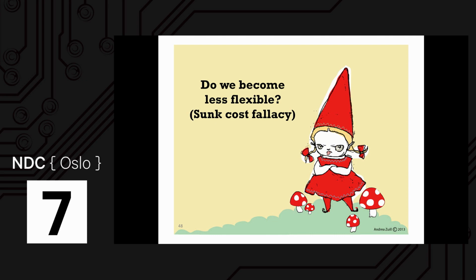And this is sort of the idea of the sunk cost fallacy. We've already spent 100,000 money units on this thing. We don't want to throw that away. We should get it done. And then we spend another 100,000 and another 100,000. Of course, here 100,000 is like a week's pay, right? I don't know. But you know what I'm saying, right? So whatever you're using to judge, we've already spent a bunch of money. That can force us into thinking we need to keep down this path that really isn't going to end well for us. But we don't yet know if it's going to end well. We need a better way to think about things.